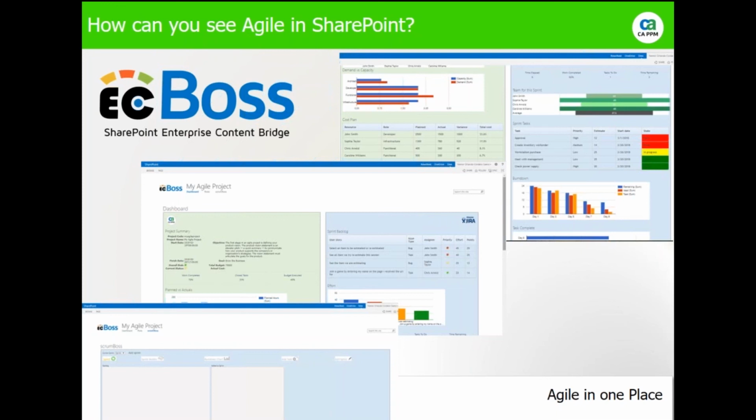Right? Scheduled finish date. Planned finish date is the estimate made at the inception of the project for the planned delivery date, whereas scheduled finish date is the estimate of a project finish date at any given point in time on the current data. For traditional projects, this is based on the task plan and a critical path for the project. For an agile project, it is based on the release plan. Given a cone of uncertainty exists regardless of project methodology, the accuracy of scheduled finish dates should be comparable for both traditional and agile.